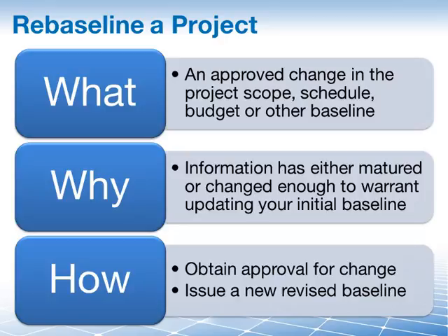As things develop, you start to remove some of the uncertainty. For example, the concept for the project might change, resource availability might change, cost might go up, and so on. Or for long projects with a high level of uncertainty, you might agree up front that you will rebaseline at certain critical points when key decisions are made or when you get within a certain time of activities.